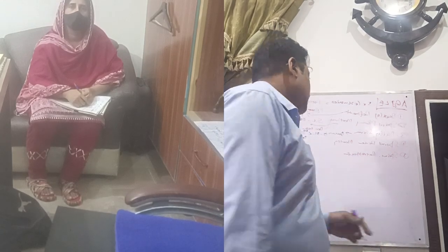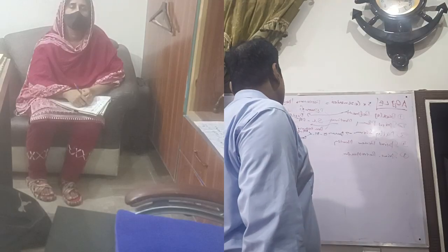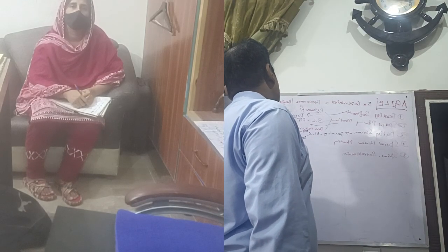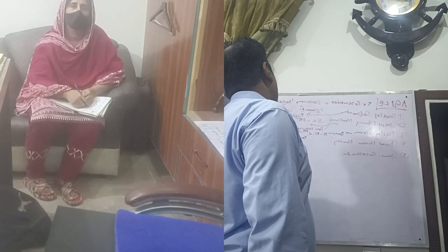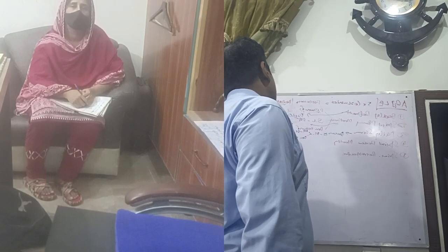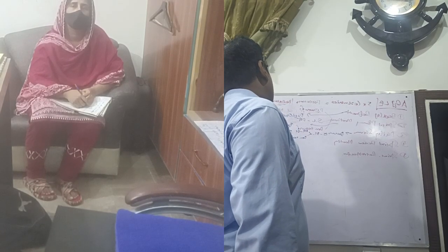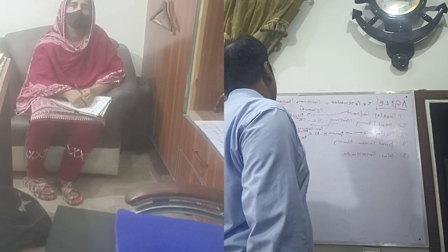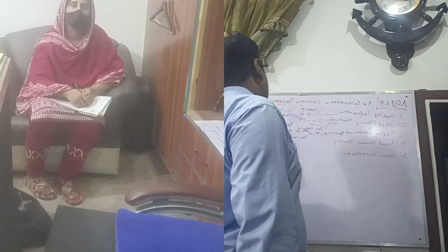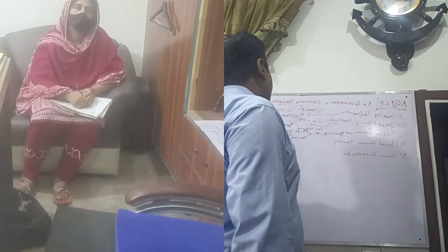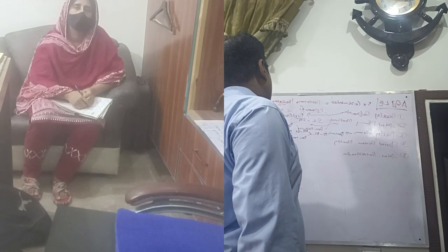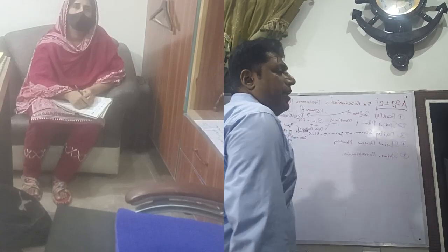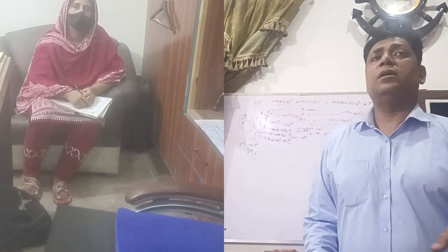Three questions are asked in a daily scrum, okay? What we did yesterday, all right? What are we meant to do tomorrow? Okay? Are there any impediments? Impediments are roadblocks. Impediments are obstacles in the project.